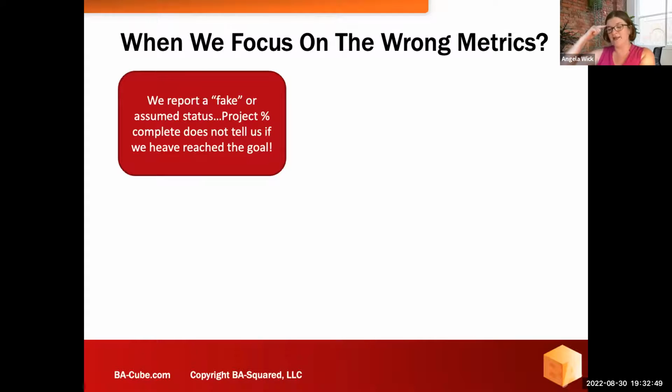And so then our leaders are like 80% complete, and they're thinking 80% to 100% of meeting the customer goal. So really our project and our requirements metrics actually give a false sense of security to our leaders on what they're expecting their money is buying them by doing the project, because they're expecting the customer behavior change to happen. So it floors me how many projects do not track these measurements as they implement, right? When that's actually what leaders care about.